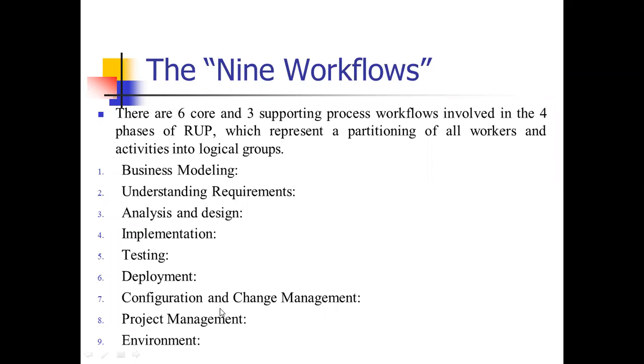Then what are the active workers during this process? Configuration manager and change manager. The work of the configuration manager is to set up the change management environment, establish the policies and write the plan for the configuration. Then the work of the change manager: the change manager will establish the change control process and review the change request.